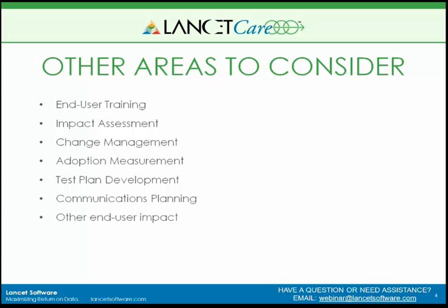And we encourage you to consider your communication planning, so how you communicate out project plans to both your end users as well as your validation teams. And then any other end user impact. So how does this upgrade fit with your users? Obviously, you don't want to schedule it for year-end inventory count or a big end of a sales cycle, things like that that might impact your end users.